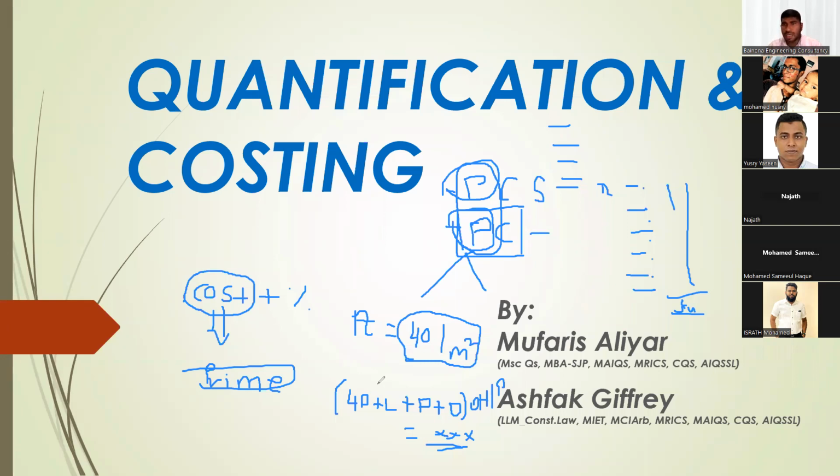Client looks at all these samples. Client finally would tell that I don't like this color. I mean, I need something else. Then the engineer is in trouble because the client wants to float the tender in 1 week, and he didn't finalize the material. So he will tell the client, you didn't finalize the material, so I cannot proceed, because if he chooses the material, only then can he go to the supplier and ask for the data sheet of that material, because each material has a different data sheet. They have different water absorption and different chemical properties. They have so many properties that will be different for each material. That will show in the data sheet. So if he confirms the material, only then can he go back and ask the supplier,